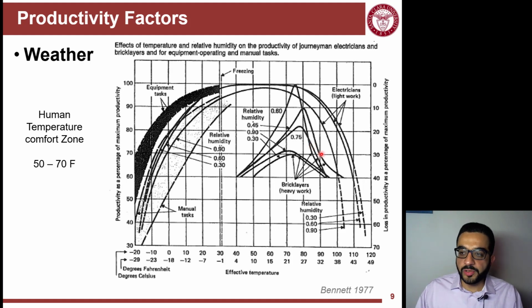So they're more sensitive to temperature, you can put it this way, than electricians. But also in lower temperature or cold weather, electricians can still work because they are working inside, right? So inside you can have heaters, you can still keep them going.